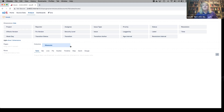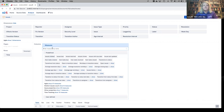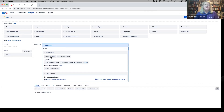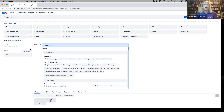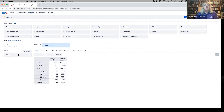So by combining dimensions and measures, we create reports. We talked about project progress over time based on resolved issues and logged hours. If we talk about project progress in time, we put time in rows and in columns we use resolved issues and logged hours. We find issues as a measure — there are several measures related to resolved issues, like story points from resolved issues and number of resolved subtasks. We'll take the basic issues resolved measure, then look for logged hours. There are several time tracking measures: original estimated hours, remaining estimated hours, and logged hours.